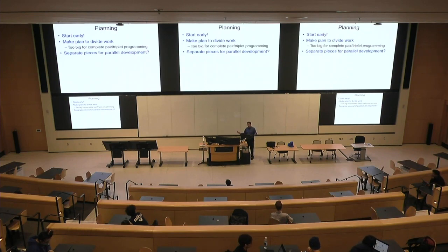So you're supposed to be displaying a path, giving travel directions, but you have no algorithm. So how can we unblock this? Because a naive way to do this would be to say, okay, well, I guess I can't test any of my path display code until after I've done the algorithm. But that's risky, right? I'm basically moving things now closer to the deadline. So what would you do about that?